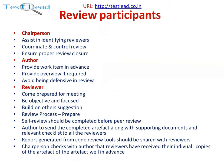The reviewer comes prepared for the meeting, is objective and focused, and builds on other suggestions. In the preparation phase of the review process, self-review should be completed before peer review. The author sends the completed artifact along with supporting documents and relevant checklist to all reviewers. Reports generated from code review tools should be shared with reviewers. The chairperson checks that the author and reviewers have received their individual copies of the artifact well in advance.